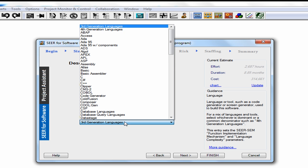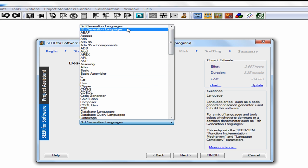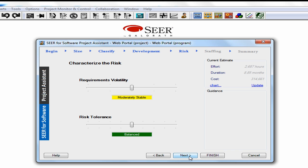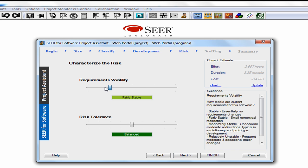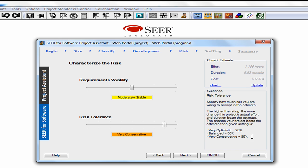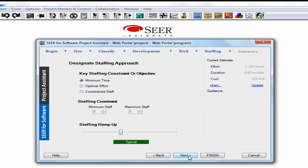Now we're on the development screen. Under the development process we can select agile novice, and for the language let's assume we'll be using some type of fourth-generation language. I'll click Next. Now we can identify any risk we understand around our requirements volatility. We also have the opportunity to qualify the risk tolerance we want to apply to the estimate — I'd like to use a confidence value of around 80%.